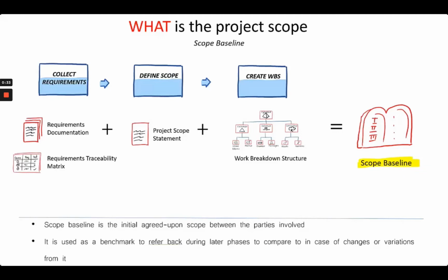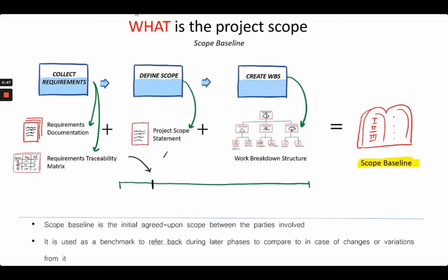As soon as you obtain the documents from the three processes that we discussed so far, you need to perform an important step as a project manager. You see, projects are always on the move, but there are some moments at which point in time you have to force things to literally freeze and stop. This is one moment when you need to freeze upon the scope and all the activity that is going on within it and capture within the scope baseline and probably set this in stone.